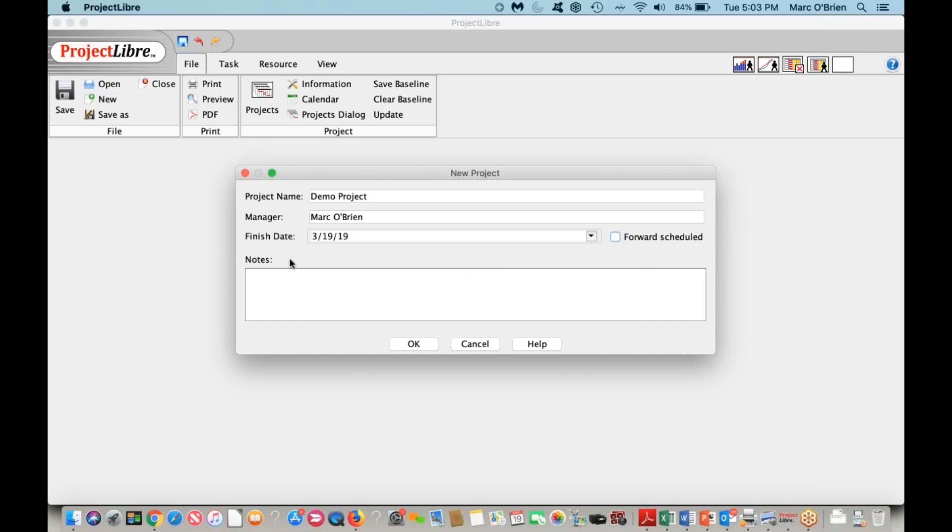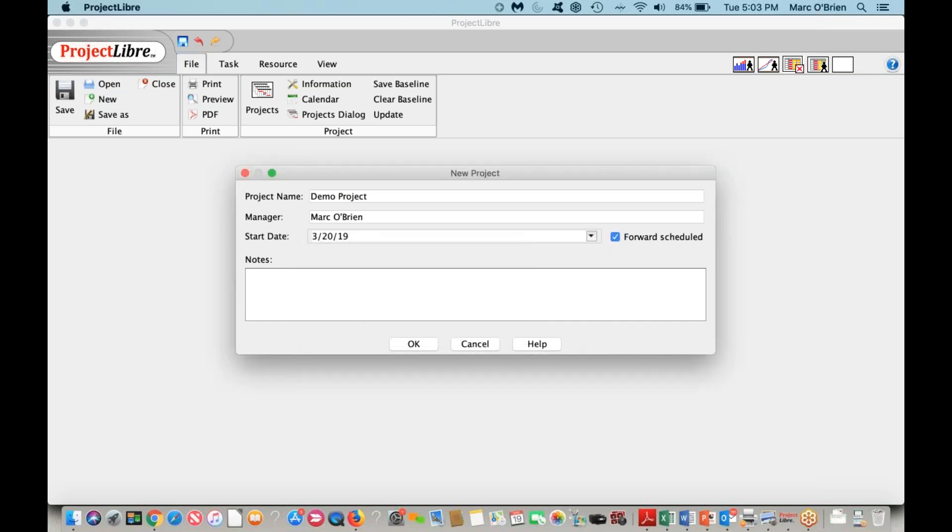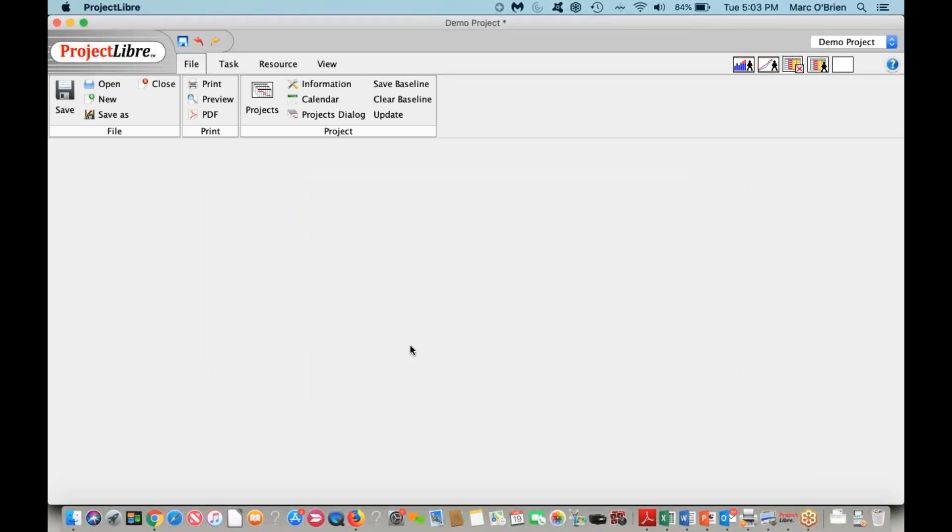If I deselect that, it changes to the finish date. So we can give it a date for the project to finish, and it'll tell us when we need to start. But I'll use forward schedule. It's not going to be today, I'll do tomorrow. And I'll add some notes saying this is a demo project, but you can obviously add more descriptive terms.